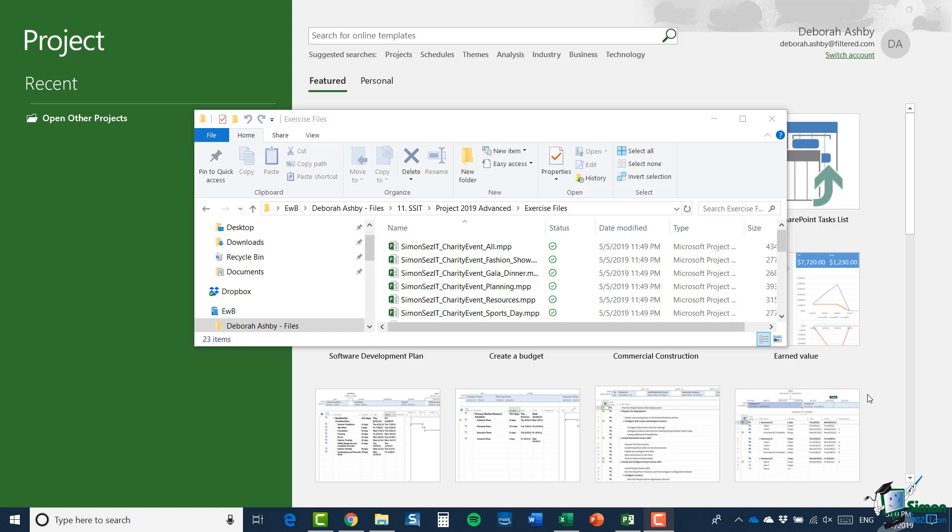Now the second word of warning is very closely associated with the first one. If you have a situation such as the one I'm going to describe in this section, where you have say, four project managers sharing a consolidated project and a resource pool, it's very important that they all know what they're doing, because even if one of them doesn't understand how to do this, one person can cause chaos for everybody else. So not only is it important that they all know what they're doing, but it's probably worth making sure that you have some sort of written rules and protocols to cover the situation.